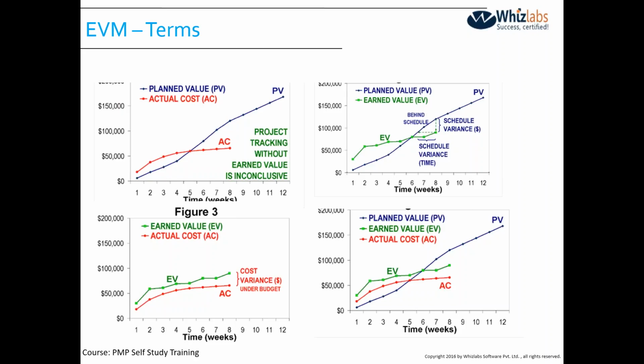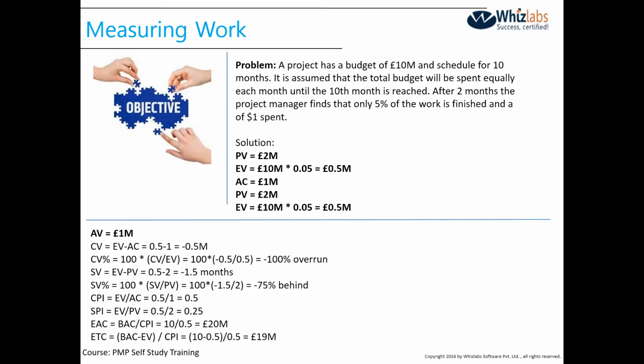In Microsoft Project, you capture all the activities and all the work packages, and you assign all the resources against each activity and work package, and their rates also. Whenever you want, you can generate different kinds of data along with this pictorial description, which is called the S-curve.